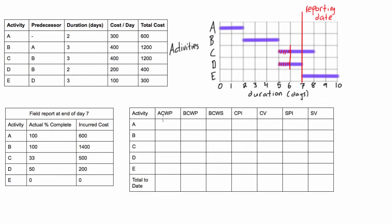Now we can fill out the table. The actual cost of work performed (ACWP) is literally how much we paid for the work done so far. Activity A incurred $600, so its ACWP is $600. Activity B cost $1,400 — we planned $1,200 but it actually cost $1,400. Activity C has incurred $500, activity D has incurred $200, and activity E hasn't started so it's zero.